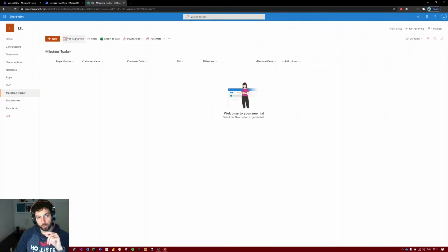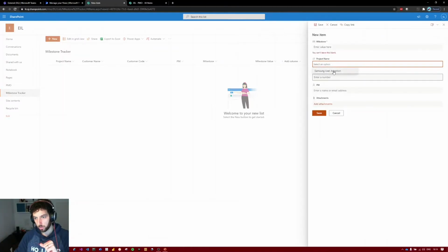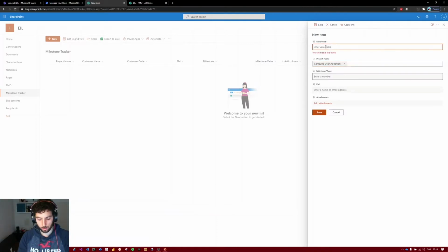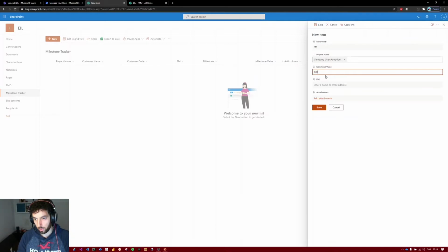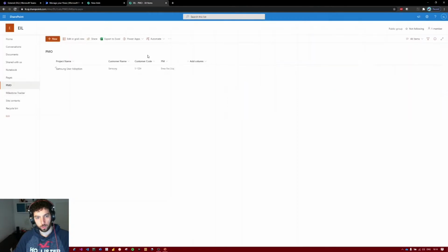So how this works is if you want to create a milestone from scratch, you will click new, project name, it will show in here. And then let's say the milestone is called M1 and the milestone value is 1000. And let's put me again in there. If you click on save, this should bring here the project name, the customer name, and the customer code.